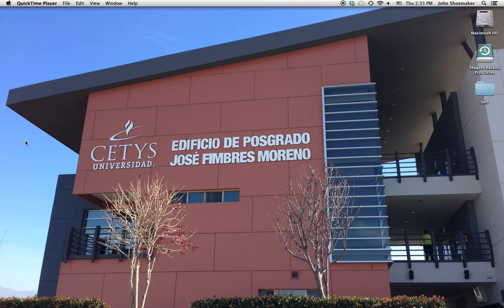The work breakdown structure is going to be very helpful in refining that estimate, because the estimate based on the project charter is going to be very speculative. As we don't know a lot of detail, we only have high-level information about the project. So once we've done the work breakdown structure, now we have much more detailed information about the scope of the project. That is, we know what work needs to be done in order to accomplish the goals and objectives of the project. That is, the work packages.